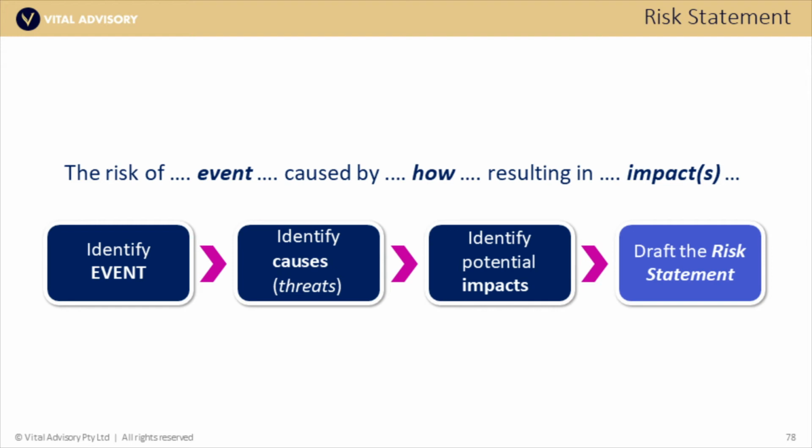The reason this kind of aggregated logic here is useful is it allows us to look at either the what or the how and the impact statement, so we can perform mitigation on a range of things, likelihood and consequence, or a bit of both, control uplift, maybe trying to avoid this scenario in the first place. So it helps us to be able to then work out a strategy to mitigate the risk.